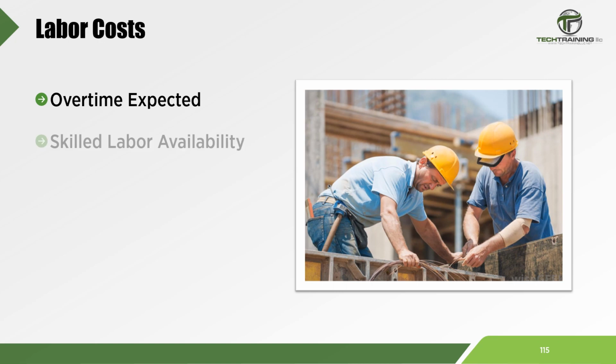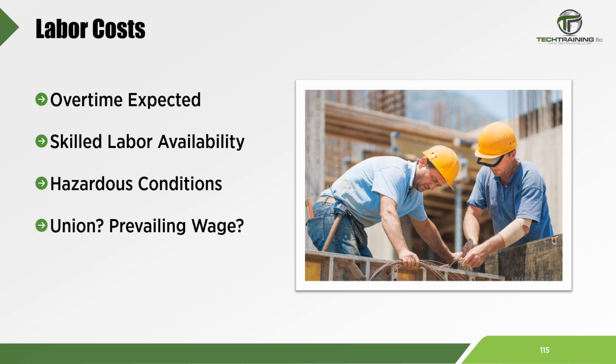Is skilled labor available in the area? If there is a lot of work going on in the area, skilled labor may be at a shortage. Are there hazardous conditions on the job? More hazards mean more regulations, and this means more cost. Is this a union project? If so, the estimator must familiarize themselves with union rules and regulations.